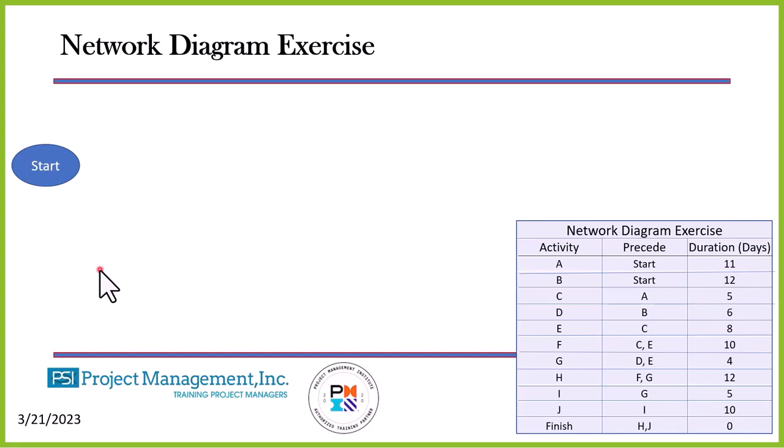We have a network diagram chart over to the right here, and this is what we call a short name. For each one of these activities, A, B, C, D, E, F, those letters represent some activity in the WBS. There's a legend somewhere that's going to identify what A relates to, what B relates to. But we would write those activities down, and then we're going to start looking at the predecessors. What precedes each of these activities? That's what we have to determine.